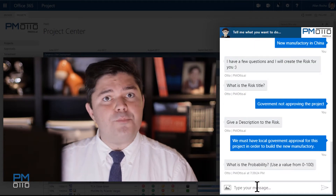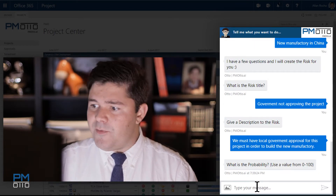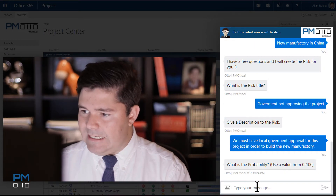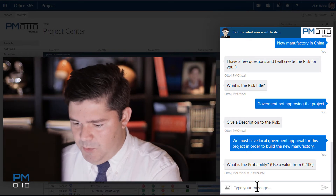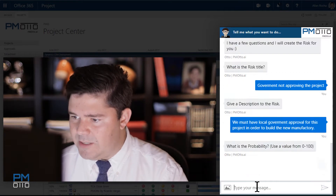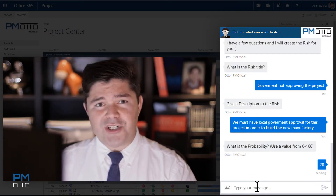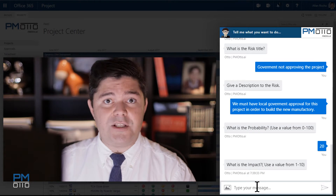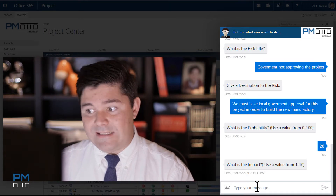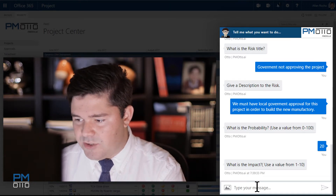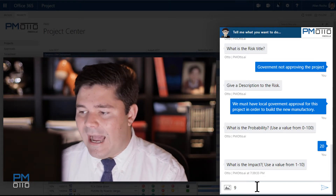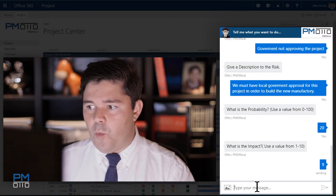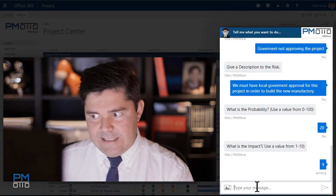What is the probability of the risk? The probability of this risk will be 20% — our project is very stable and has a very solid base. What is the impact? The impact on this risk is highly high, so I would say that is a 9.